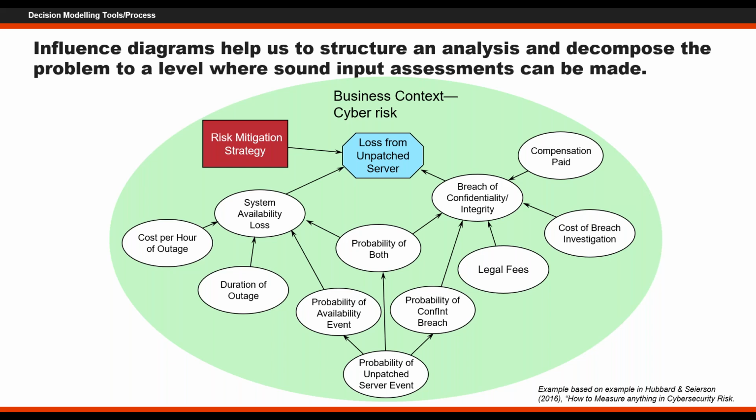Yeah. And what we also saw from the poll is that the majority are using heat maps. So we highlighted some of the weaknesses of the heat map. But the message I'm taking away is don't stop using the heat map. The heat map is a good first-stage prioritization tool. So use it to prioritize if you end up with 100, 200, 600 risks. If you just want to prioritize what your risks are, then a risk heat map is a good, simple, basic tool, but don't stop there.